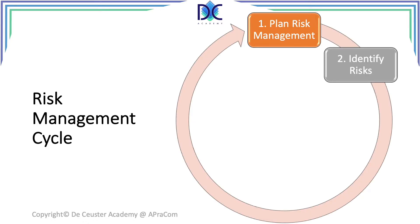The next step in the process is about risk identification. In this step we will identify the risks, both threats and opportunities. Each risk will be characterized, which includes a short description of the risk, the impact, the probability, the time horizon, and other relevant parameters as described in the risk management planning. Once the risks have been identified and characterized, we will conduct the risk qualification. Here we will evaluate the risks based on impact and probability, and identify the risks that will have to be quantified, monitored and accepted.